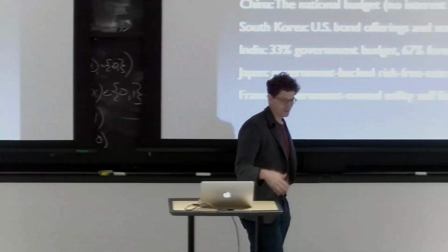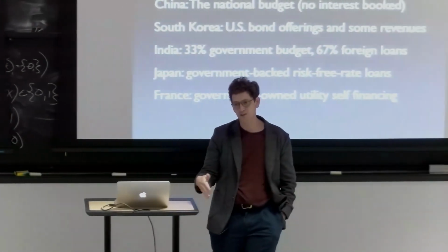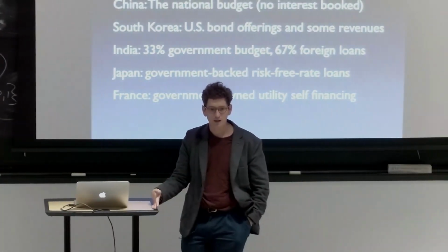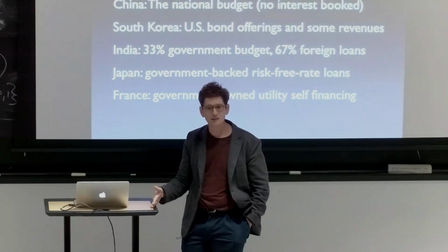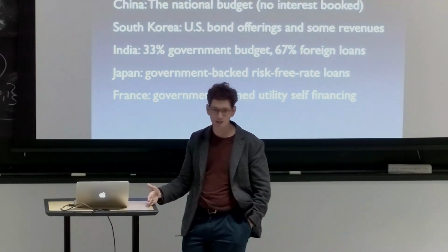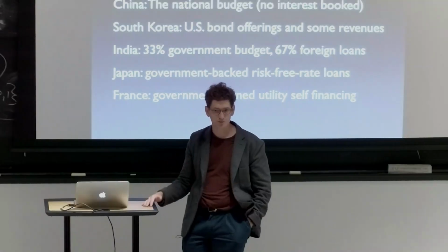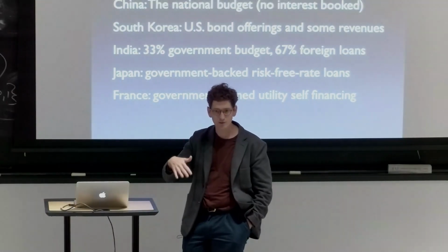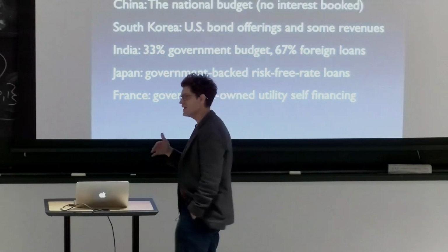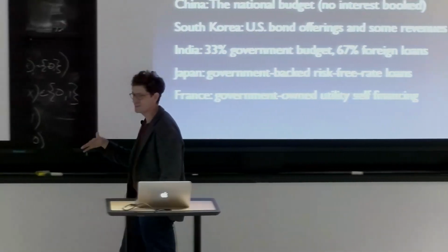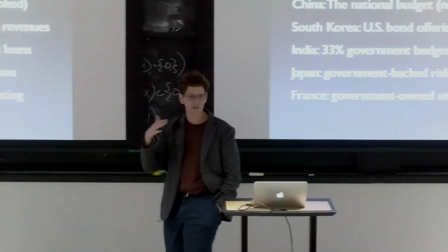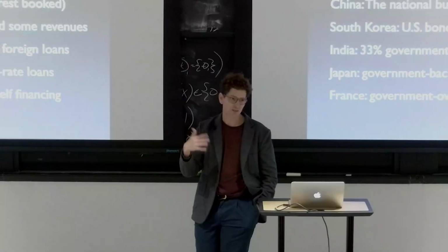Basically, the federal government says, we will guarantee, let's say, $4 billion of your plant. You can take a loan, and we guarantee to whoever loans you that money that you will not default. And so you can charge the risk-free rate, which means a very, very low interest rate. And as part of that process, if you look at the details, the bank that issues that loan is actually government-owned.